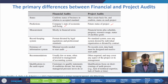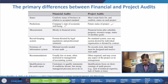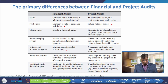With respect to qualifications in the audit report, it is customary to qualify statements if conditions dictate, but there is strong managerial pressure not to do so. For the project audit, qualifications focus on shortcomings of the audit process itself, such as lack of technical expertise or lack of funds or time.